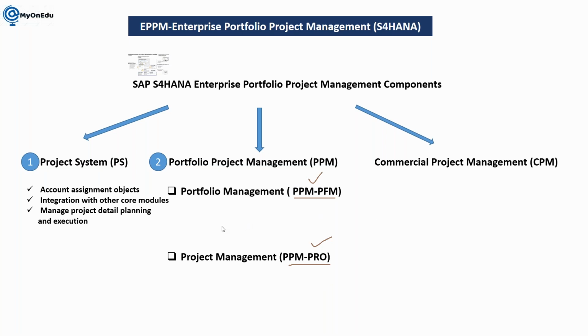Okay, so what portfolio management is doing here is helping us manage the portfolio structure and pre-investment analysis. Whenever you are going to start any investment project, you can do pre-investment analysis. You can calculate your NPV, net present value, your IRR, internal rate of return, and the payback period. Accordingly, you can decide whether this project will be beneficial for us or not.